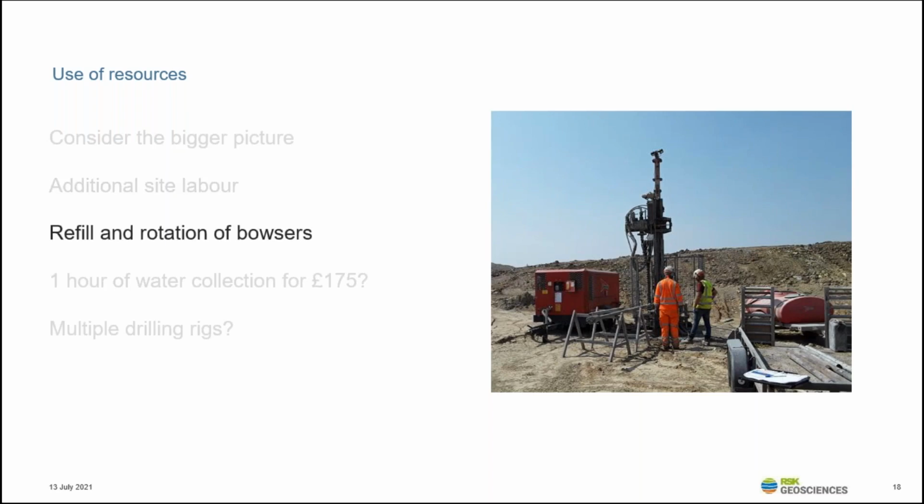rotary drilling, as we've got here. Would an additional labour resource be able to maintain and refill the water bowsers, in addition to helping with moving the rig and the drilling setup between boreholes? So if we consider a rotary rig at, say, £1,400 for a day, if the crew, every time they had to go and fill water, with that maybe taking an hour, that's £175 to fill a bowser, which I think a lot of people would say, if I offered you £175 to spend an hour filling a bowser, you'd probably do it.